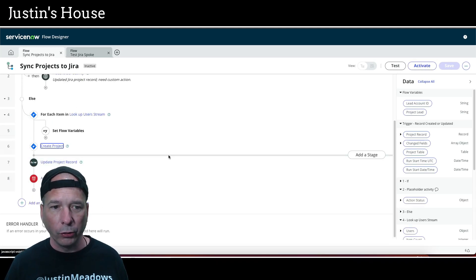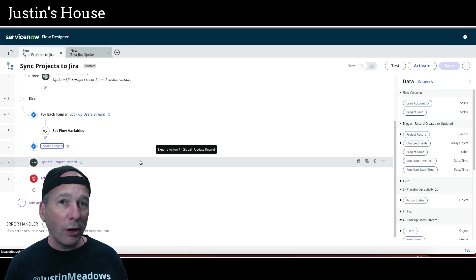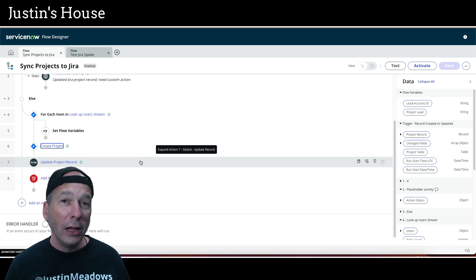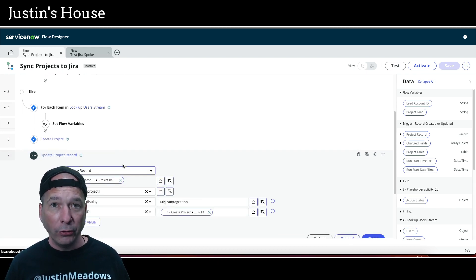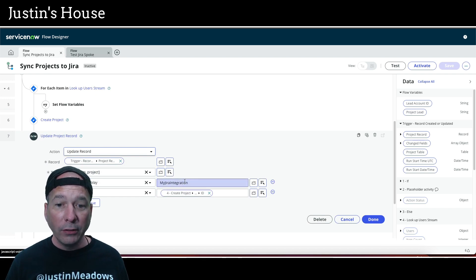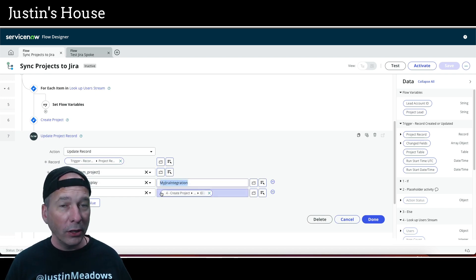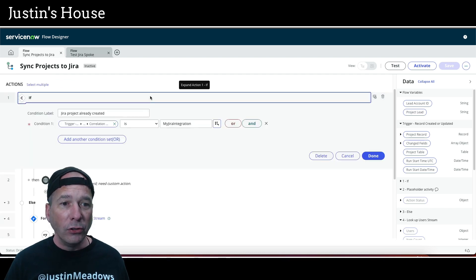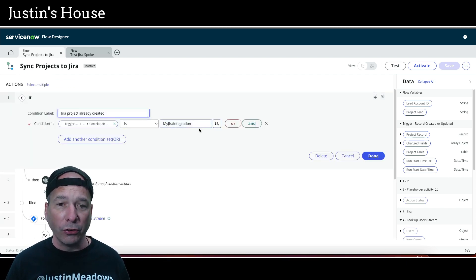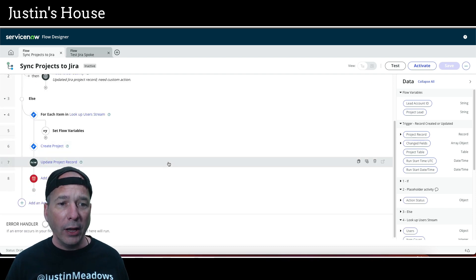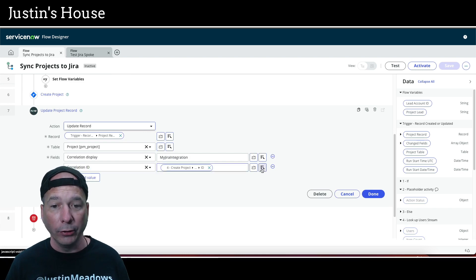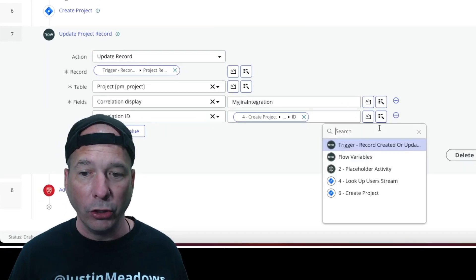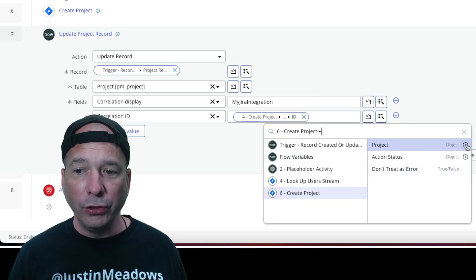Now that we've created the project in JIRA, we need to make ServiceNow aware that the project exists over in JIRA and that they should be in sync. So we're going to update the project record that triggered this whole flow. We're going to set the correlation display to 'my JIRA integration' — remember we could have set that to anything, but we chose 'my JIRA integration.' You can see it on the if-statement — those things need to match. Then we're going to set the correlation ID field of the project record to the ID of the JIRA project.